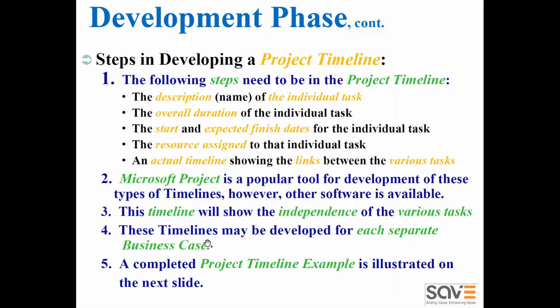When will the DVP be completed? When will the testing be completed? When will the T1 samples be ready? When can they do the T2 samples? When will the supplier do the T3 samples? All the micro level time plannings are very much essential in this step.